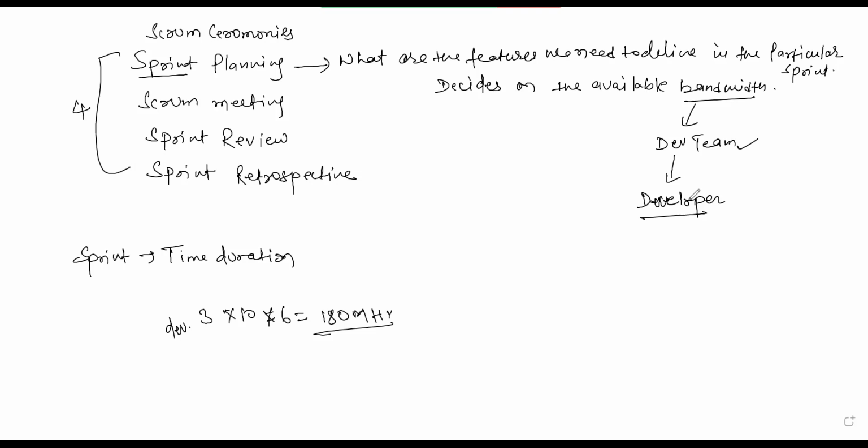because we have to deliver the story. To deliver the story, what is required first? The first thing, the story should be developed, then tested, right? So this is for two weeks of the developer, right? 10 days, 5 working days. And for the tester, let's say two testers are working. For them, I'm also taking 6 hours.